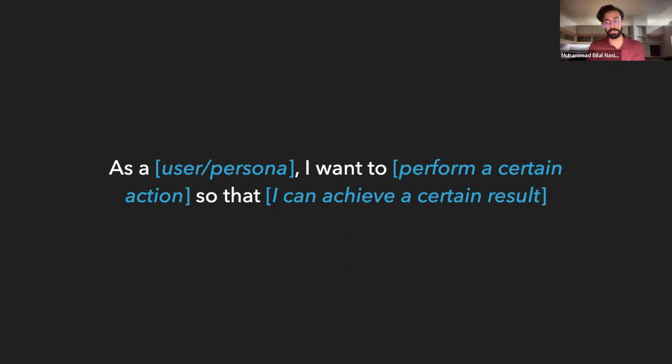Choose a specific feature, choose a persona, define what action can be performed, and then what result can be achieved by performing that action, if you want to, of course.